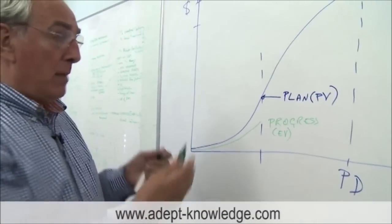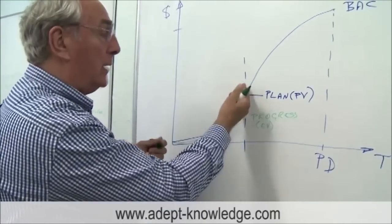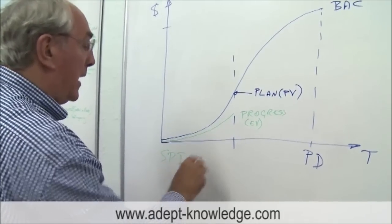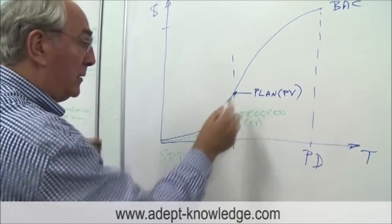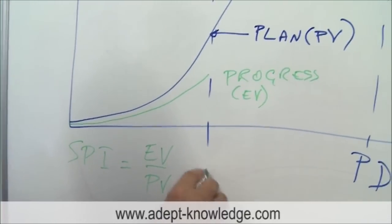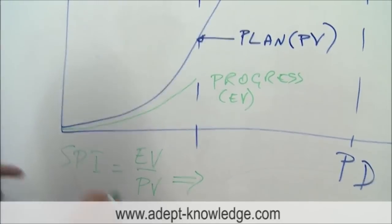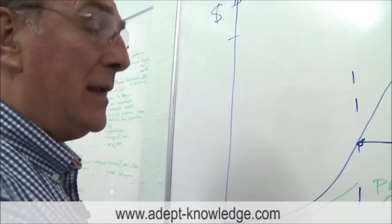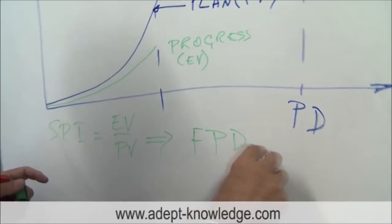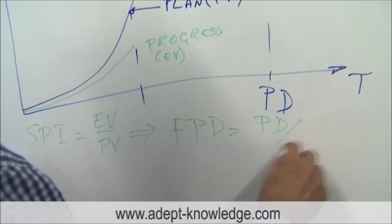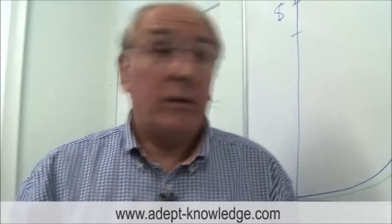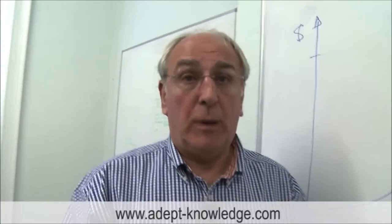For example we could by measuring an index of how well we're doing against how well we thought we were going to do, that's called a schedule performance index and that simply is a measure of the progress divided by the plan or we could say EV divided by PV. And then using that index if we simply take the project duration and that index of performance, what we can do is make a forecast of the project duration and that is simply the project duration divided by this schedule performance index. I think that's a pretty important index because this is really your effectiveness. How well are you doing in relation to what you plan to do?